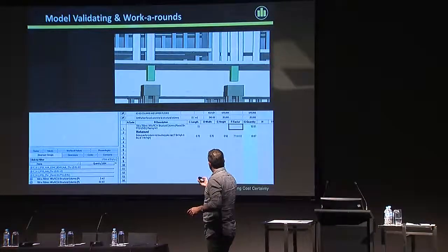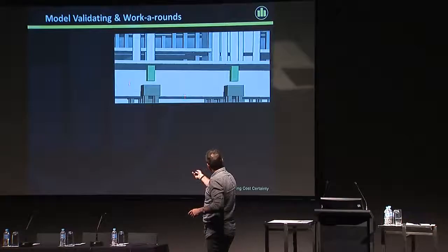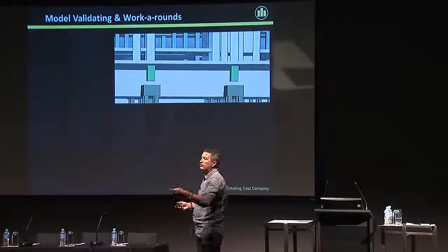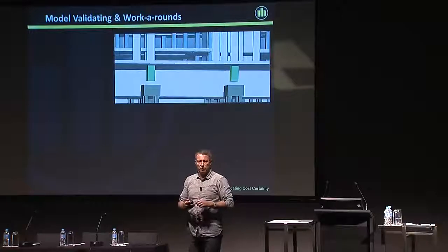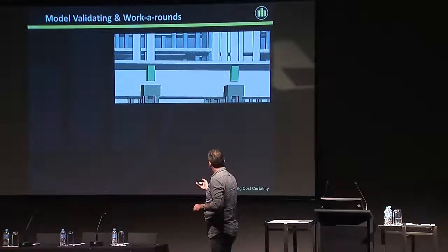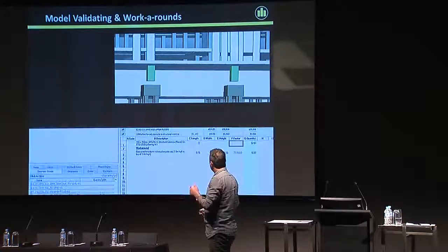What he did in this instance is he's looking for where things don't clash. From a quantity perspective, if it clashes, the quantity's probably right. It just needs to be moved around. If something's missing, we haven't got enough quantity in it. So what we've identified here is Scott's come up with this gap. He lets our QSs know.